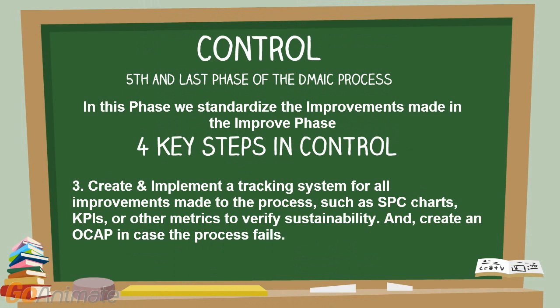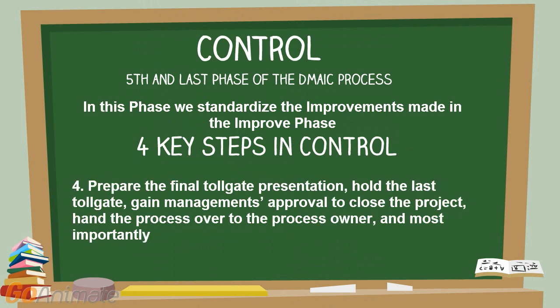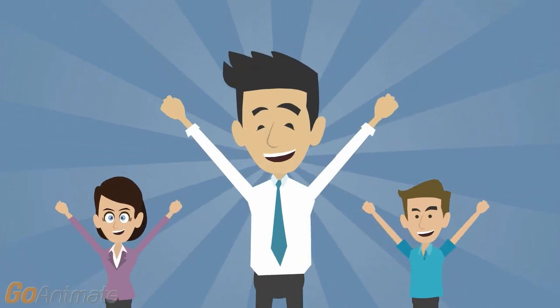Fourth, create an OCAP — Out of Control Action Plan — in case the process fails. It is a flowchart of what actions to take if the process fails. Oftentimes, if the new process is unsustainable the team will reconvene. Fifth, prepare the final tollgate presentation, hold the last tollgate, gain management's approval to close the project, and hand the process over to the process owner.